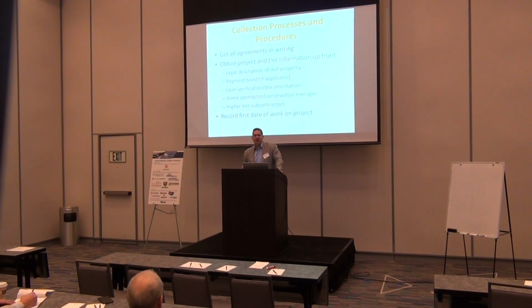It's really good to know if you have a payment bond on a project, because that's another pocket, particularly if the contractor is on shaky grounds financially. And sometimes that happens. Sometimes there's a contractor that is in a tough financial situation, and so they're paying very slow because they're having cash flow problems. Well, having a payment bond and keeping the surety informed if you're not getting paid timely can usually help, because the surety has the right to essentially step in the shoes of the contractor, take the money from the owner, and then pay that to the subcontractor.